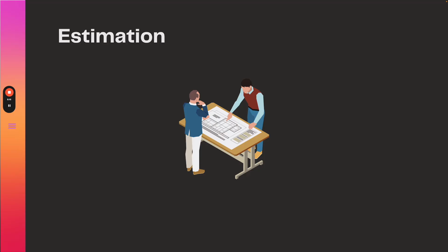And now you will have seen this on the Kanban board and demonstration that I did. Divide the project into smaller, more manageable tasks, such as user stories or use cases. Again, we spoke to those in some previous modules. Then estimate the effort required for each task. Assign an estimated effort in hours or days for each task, taking into account factors such as complexity, uncertainty, and dependencies. Then use some historical data. You can look at data from previous projects that you may have done to inform your estimates and identify patterns or trends that can help you make more accurate predictions.